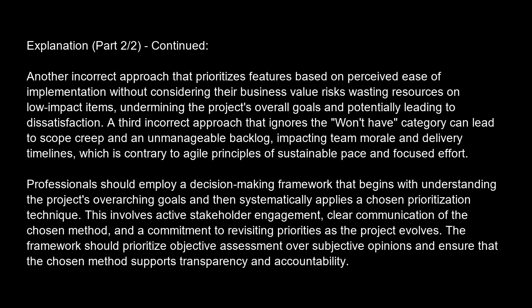A third incorrect approach that ignores the won't-have category can lead to scope creep and an unmanageable backlog, impacting team morale and delivery timelines, which is contrary to Agile principles of sustainable pace and focused effort.